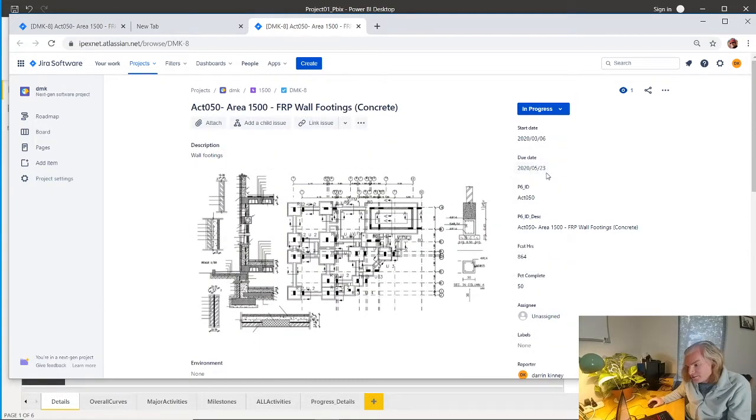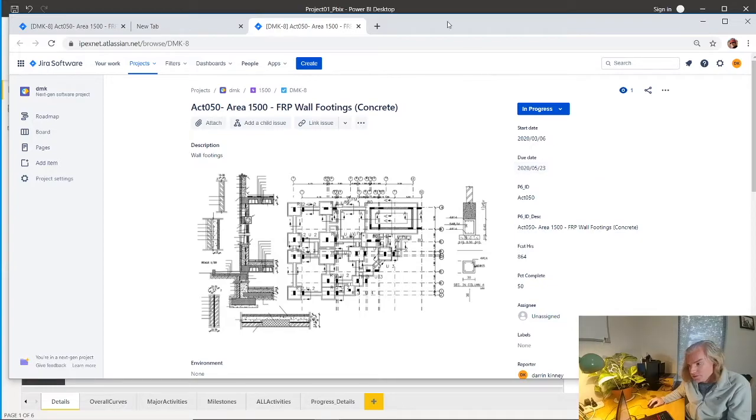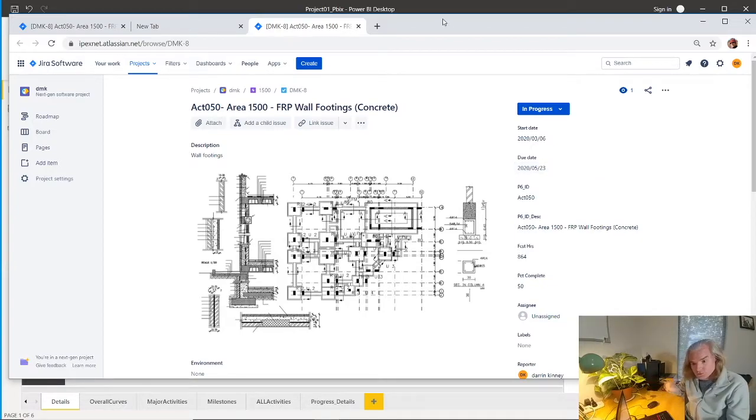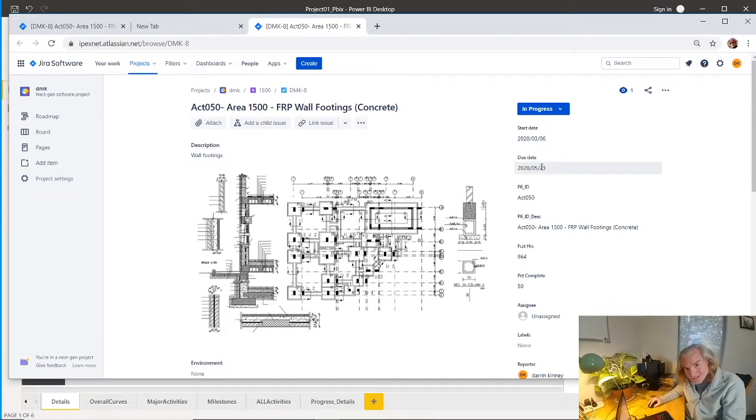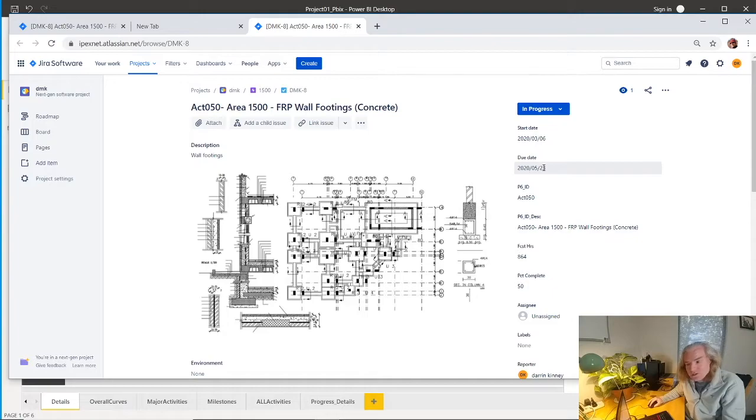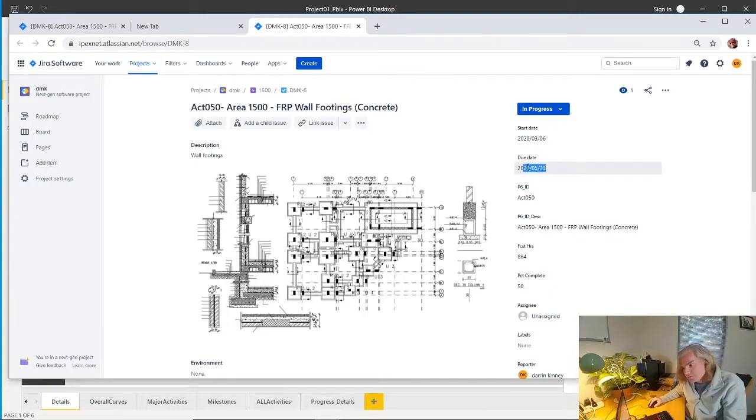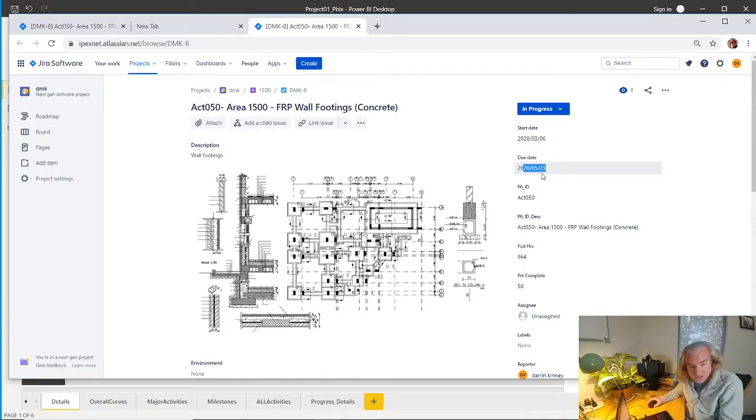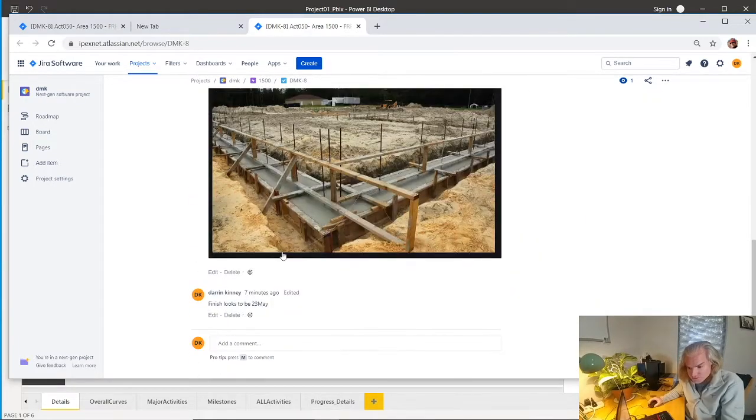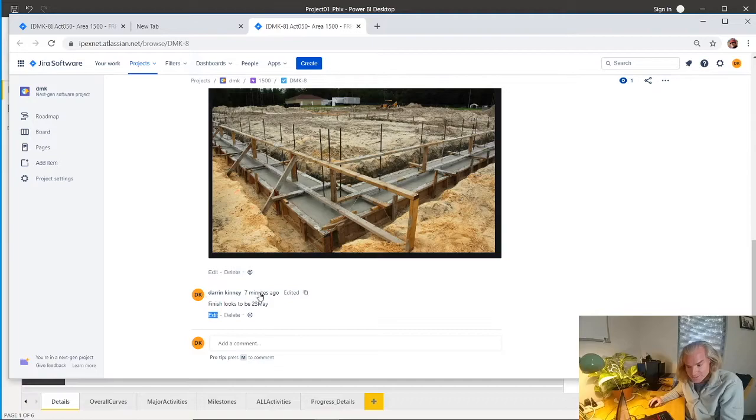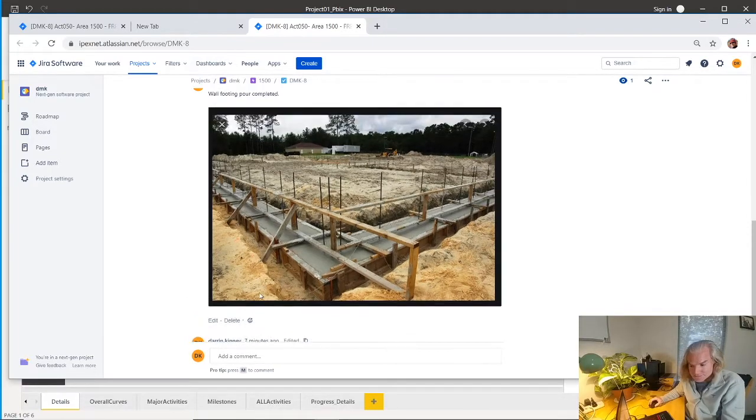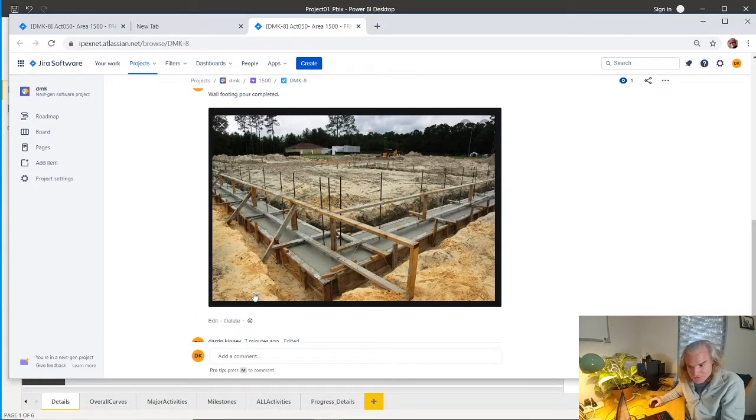They edited their main attribute. So when we look at our schedule, or the planner updating the schedule, they wouldn't have to go talk to this person. They wouldn't even have to know what's going on. They could just put May 23rd from the information in here. And it's auditable because the person put a note with their name and date. You should have pretty good visibility of what's going on.